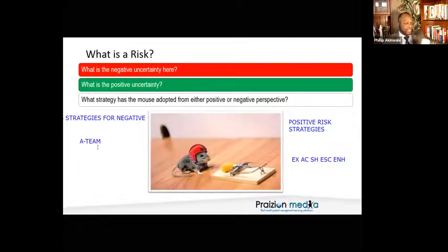A lot of folks get these two mixed up on the exam. You need to be ready for those borderline questions. Oh, Phil identifies a risk could occur. He creates a robust plan to deal with the risk if it happens. It's accept. Because you're not carrying out your plan until the risk occurs. So this is some of the trickery that I want you guys to be aware of on the exam. Okay? Very good. Let me give you a few positive risk questions.